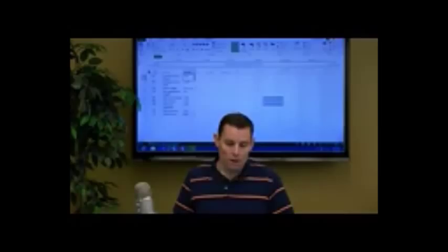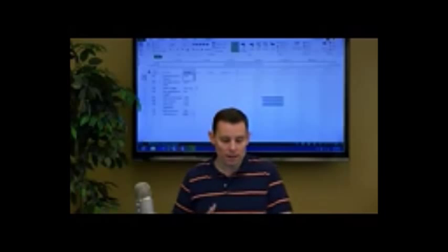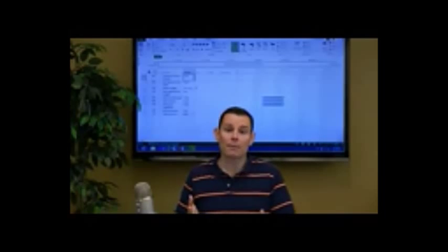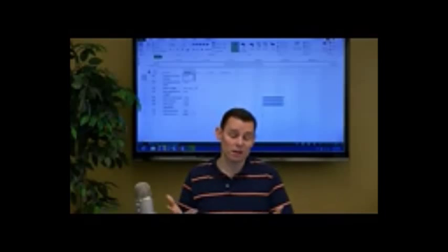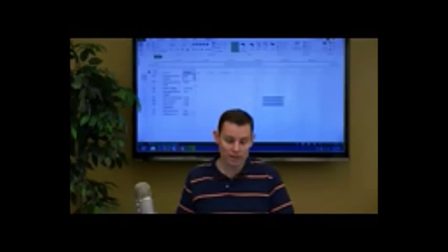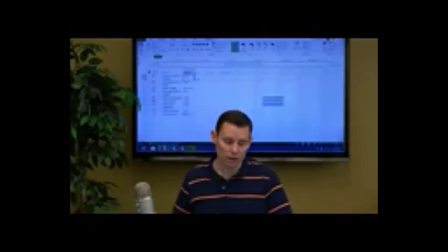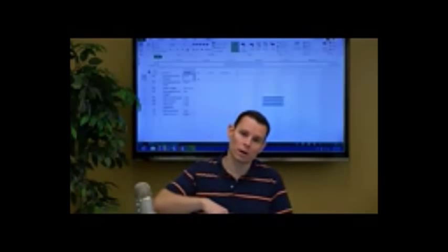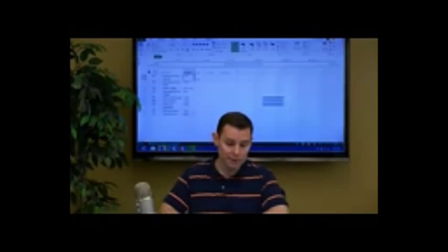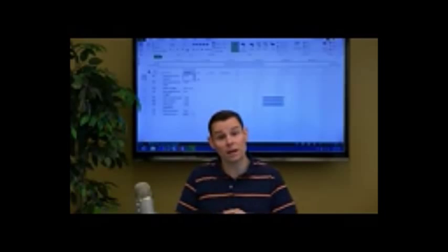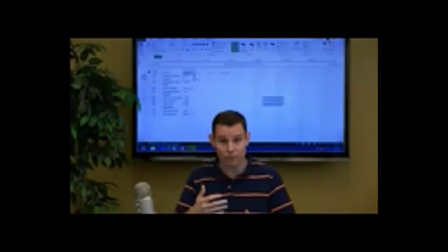Okay, one of the best practices with a project, I suppose, is to not only estimate the time it's going to take, but also check with stakeholders to see, okay, is it realistic that brainstorming will take 2 hours? Is it realistic that the boss can approve something in 2 hours? So go ahead and ask your stakeholders, people involved, or people with past experience how long things took. So I asked folks how long the company party took last year, and they said, oh, it was about a day because we had to meet a couple times. We had to come up with a formal list for the boss. So you're going to want to allocate a day there. So I'll type 1 day for the brainstorm task.